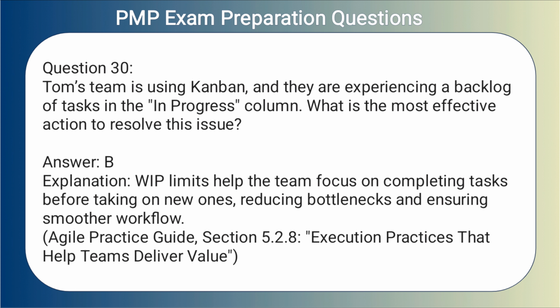Answer. B. Explanation. WIP limits help the team focus on completing tasks before taking on new ones, reducing bottlenecks and ensuring smoother workflow.